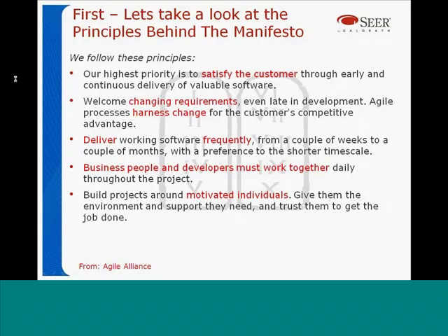What that's going to mean for an estimate is things like the next line. The requirements are going to be changing over time. So there's going to be a necessity when you build your estimates to plan for requirement volatility, as well as incremental builds, which the third principle mentions, where you deliver working software frequently. So in an Agile approach, you have changing requirements, and the software is delivered to the customer in an iterative fashion over a time to be determined by the different groups.